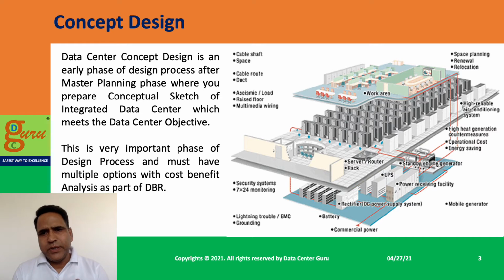This is a very important phase of the design process, and typically each and every stage of this design process is important because these inputs are dependent on each other. If you want to make any changes, then you have to go back to the previous stage, correct it and come back. That is the reason the accuracy of completion of each and every stage is very important.